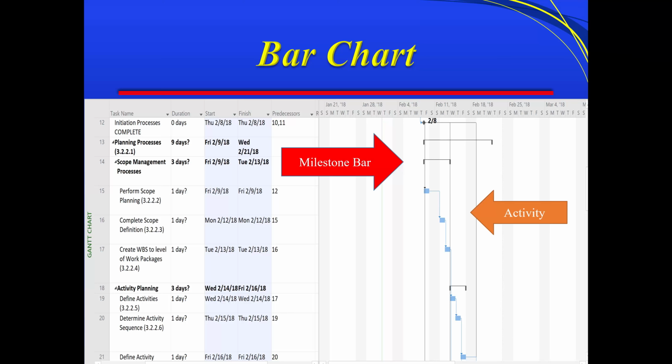It really makes no difference in the real world. I know what you're talking about when you say, well, this milestone is 47 days. The activities add up to 47 days for that milestone, but for the PMP test, the milestone has zero duration. The activities do, but just for semantics for the test, make sure you know something like that.